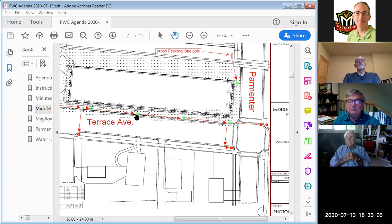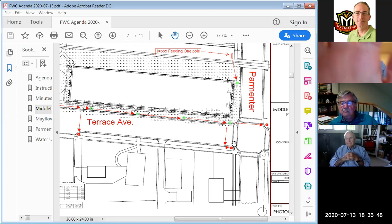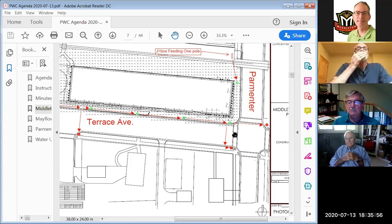A different option that Brian mentioned, and each of these has some downsides. I mean, anything that we put over it to protect it is subject to being disturbed or exposed at some point during construction. So the second option is just run a ground level conductor in conduit on the ground, bypass all of these bases and feed power to the streetlights that way. A third option would be to set a temporary generator and power the streetlights that way. It would have some connection there that would be potentially exposed to someone fooling around with it. And a fourth option would be to just turn these things off and leave them dark till May, which has some potential safety risk for pedestrians crossing the street, especially as we get into winter and it's dark most of the time.